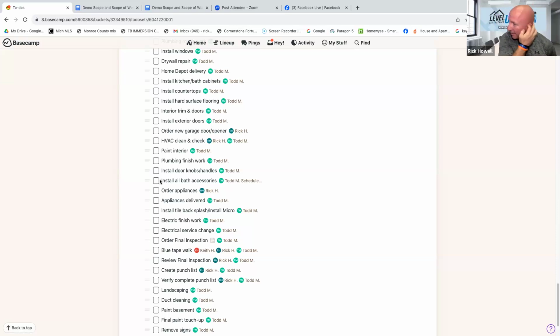And in that time, we like to make sure we can help our guys make as few trips as possible. So from there, the appliances will get ordered, the appliances will get delivered, and the electrical happens during that time. That way, when he comes back, he can do all his installs and stuff at the same time. He doesn't have to make a bunch of trips.